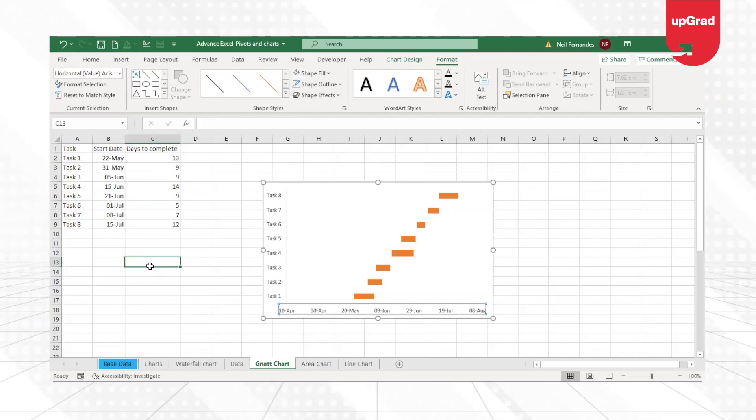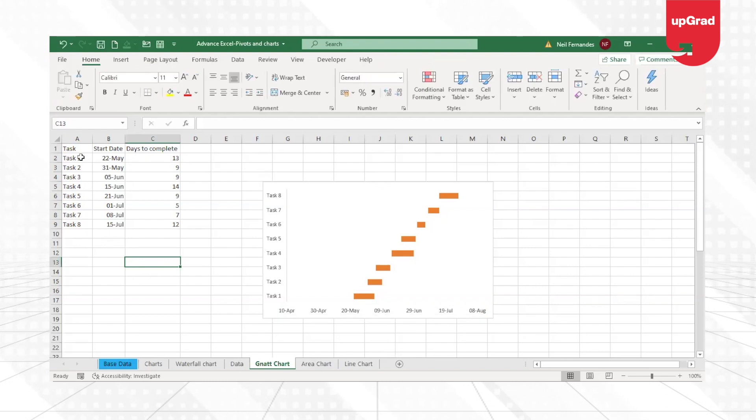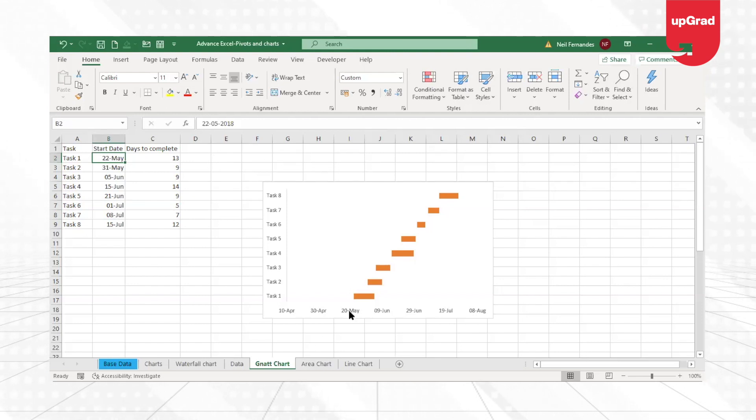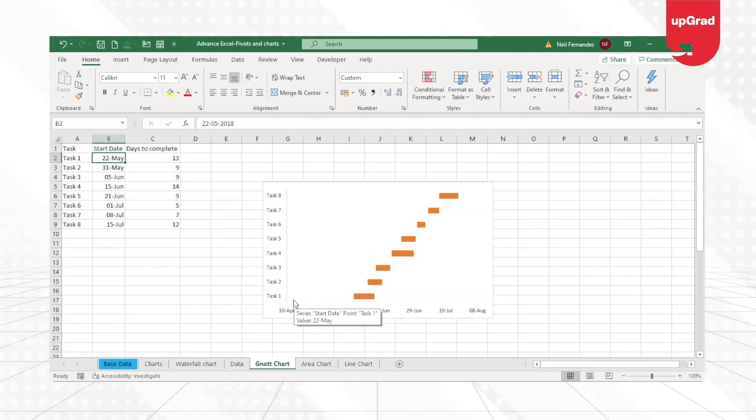What I need to do is I want to take this 22nd May as my start date, or I can take even the 20th of May as a start date. One or two days here and there so that this bar starts from here, which is the starting point of the project.